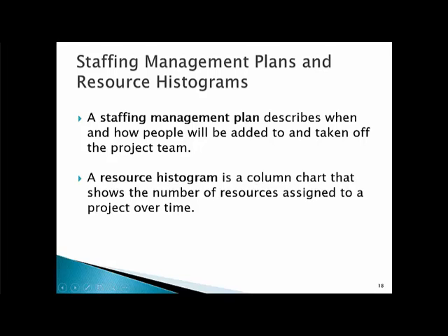The employees assigned by the project manager can be represented by a histogram chart that shows the number of resources assigned to each task in the project. This will assist in deciding the need for additional resources, or if I need to bring the employees in overtime to finish the project either faster or to finish it within time if I'm late to meet one of the requirements' due dates.